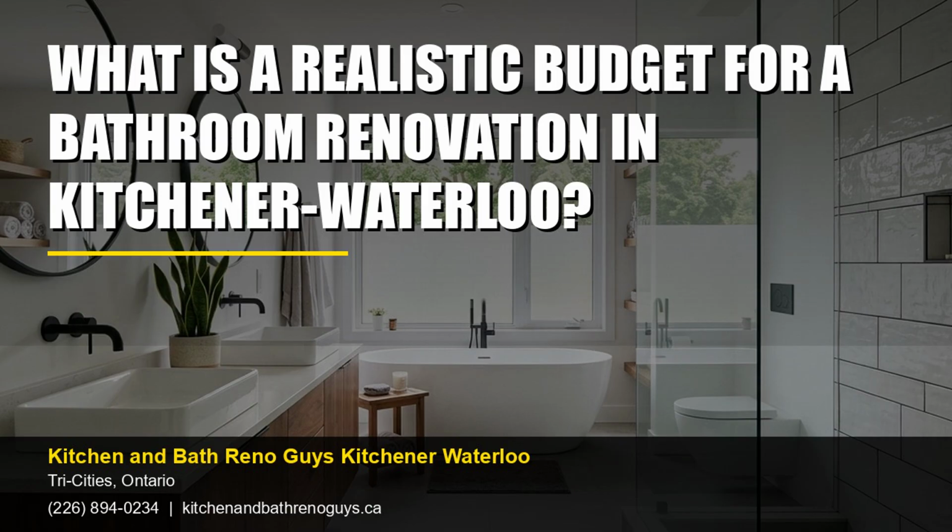For instance, opting for ceramic tiles instead of natural stone can save money without compromising on style. Labor costs in Kitchener-Waterloo are another major component of your renovation budget. Hiring a professional bathroom renovation contractor, like Kitchen and Bath Reno Guys, ensures quality craftsmanship and can help avoid costly mistakes. Labor expenses typically cover demolition, plumbing, electrical work, and installation, which can account for 40 to 60% of your